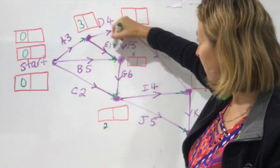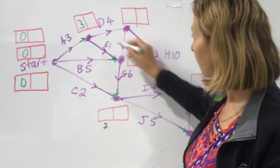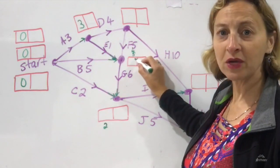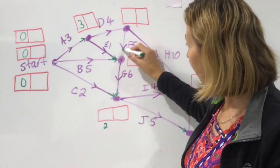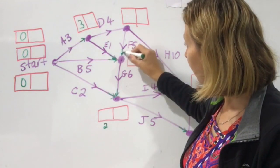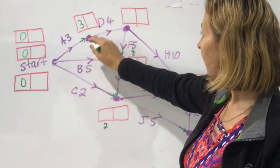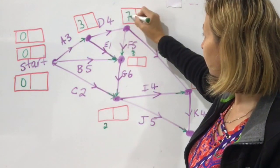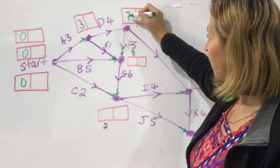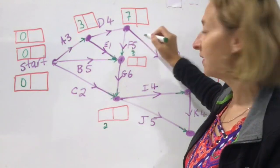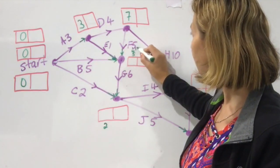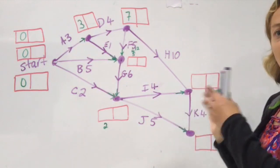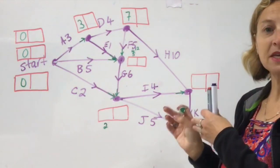Three plus one is four coming into there. So with that arrow coming in, I do three plus four which is seven. Then seven plus five is twelve — that's a big one. Remember, going left to right, I want the biggest number.